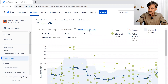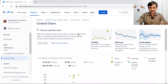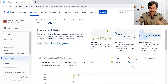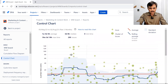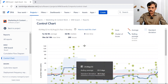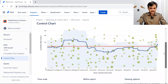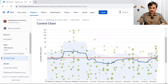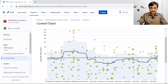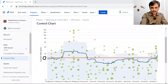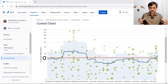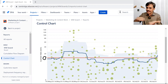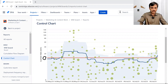When I click on Control Chart it will extract the data and plot the chart for us. I can get help about reading this chart by clicking 'how to read this chart.' Let me try to explain these things myself. The issues are small dots, and a big dot is a cluster of issues. This is a control chart — it starts with a midline which is the average cycle time. If I have 100 issues and take an average, that will be the average line.